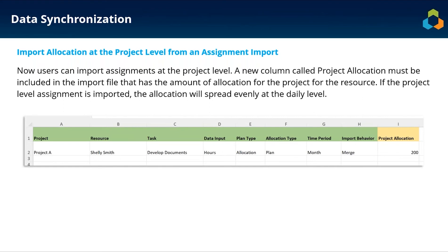On the data synchronization side, the Excel assignment import now supports importing at a project level. Previously you could import at monthly, quarterly, daily, or weekly levels. Now you can specify the project, resource, and task, then provide a single project allocation value. Tempest will take that allocation and equally distribute it throughout the project based on the project's start and end date, rather than requiring the data to be time-phased in the import file.